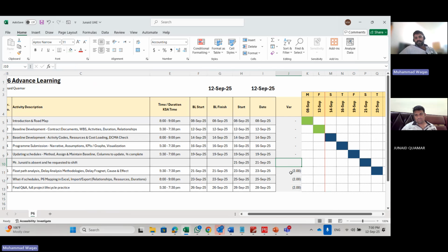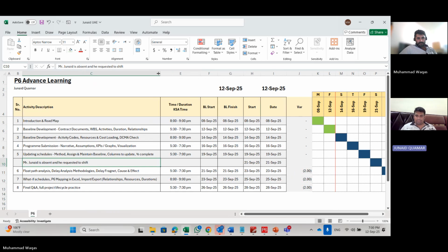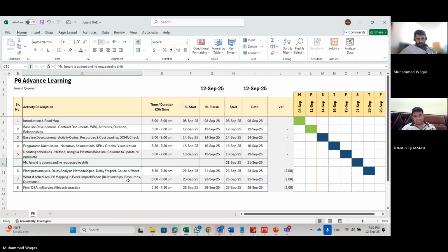So there's a 2 days delay now, right? Yes. Okay, so why is this a delay? Because of this gentleman or because of the client? Yes, because of the client, there is a delay of 2 days. Now I have added this one, and I am saying that earlier my completion was 26 September. Now my completion is 28 September. There is a 2 day delay, and the delay is due to Mr. Junaid. So I am entitled to 2 days of extension.